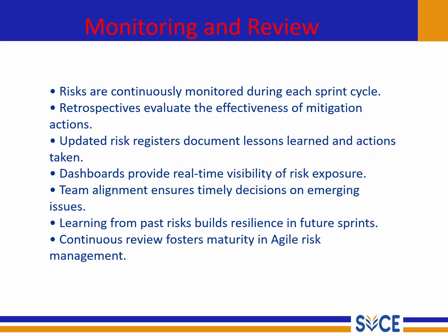In the next slide, we will see monitoring and review. Risks are continuously monitored during each sprint cycle. Retrospectives evaluate the effectiveness of mitigation actions. An updated risk register documents lessons learned and actions taken.